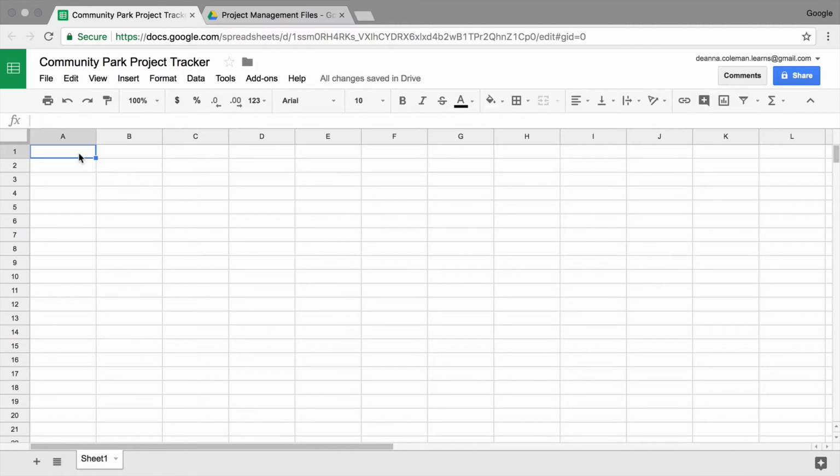These categories are the major aspects of your project that you will update and track. Include the following basic categories: tasks, the date the task started, the task's due date, the owner of the task, who is the person taking responsibility for it, notes to record additional information, a resources column where items important to the project will be linked, such as the project charter from Activity 1.